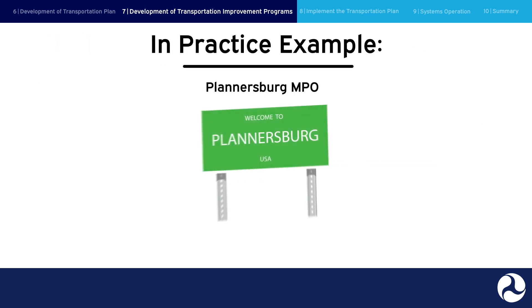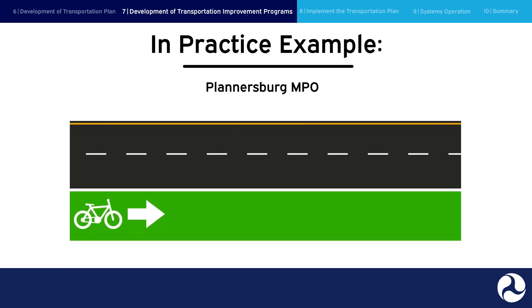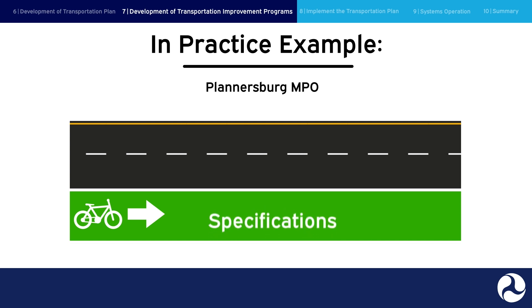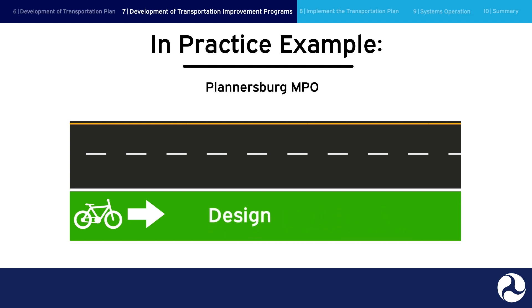In practice example: as part of the TIP development process, the Plannersburg Public Works Department submits a proposal to implement one of the plan recommendations located in their city. They develop a bike lane project proposal for consideration in the TIP that includes detailed information, locations, specifications, budgets, funding sources, timelines, and cost estimates for environmental review, design, and construction.